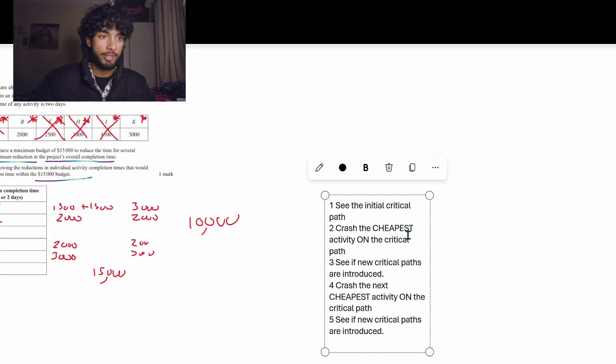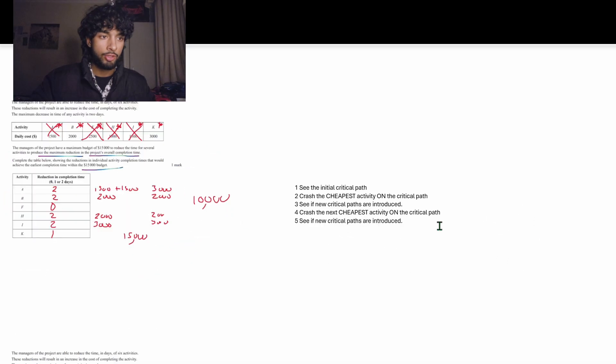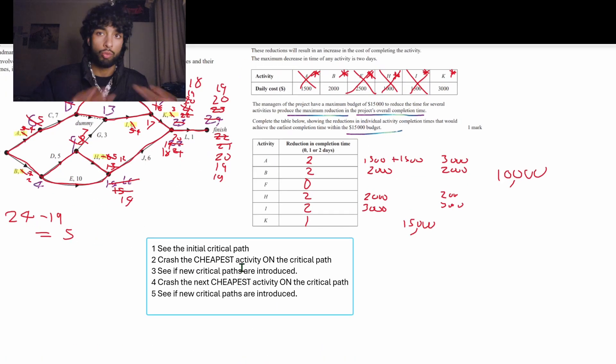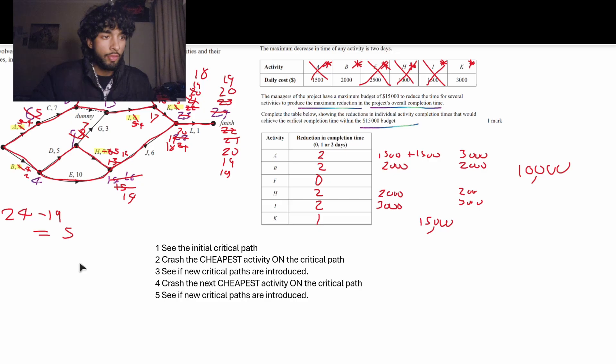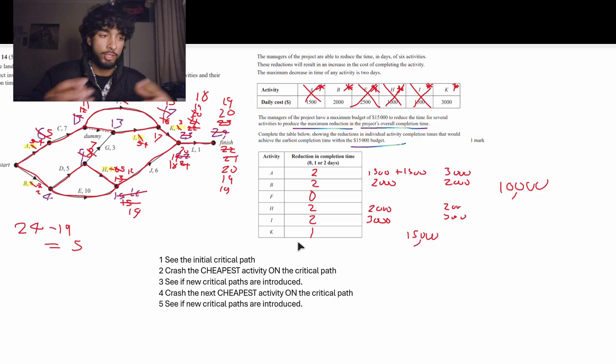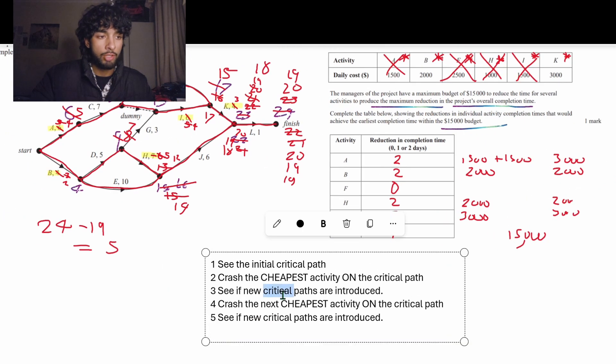So let me summarize both methods. In the first method, we saw the critical path without doing anything, without doing any reductions. Then we crashed the cheapest activity on the critical path because we want to minimize the amount we're spending. Then we saw if new critical paths are being introduced. And we kind of repeated this cycle until the budget has been maxed out.